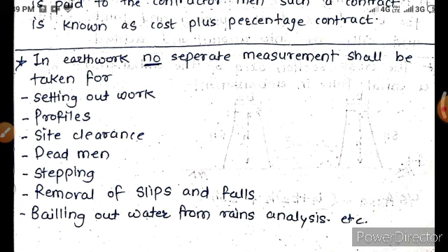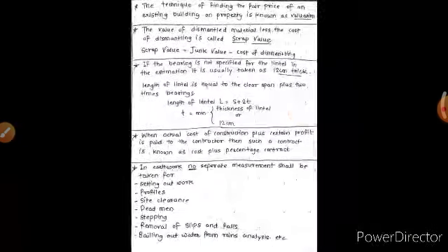In the earthwork, no separate measurement shall be taken for setting out work, profiles, site clearance, dead man, stepping, removal of slips and falls, and bailing out water from rain.